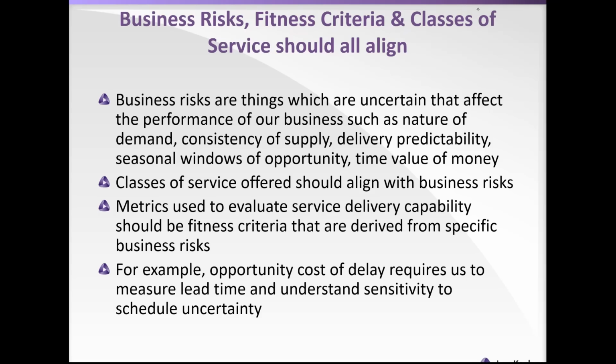So if we care about that, if we care about how long it takes for delivery, then the metric we need is lead time. From the point of commitment, how long will it take until we've received delivery of our request and we can start getting a benefit from it. So opportunity cost of delay is a business risk, and on the delivery side there's the schedule risk of how long it will take to deliver. Therefore the metric we care about is lead time, and if we're managing the risk and opportunity cost of delay, we will have some expectation for what's an acceptable waiting time to take delivery. How much of the opportunity are we willing to lose before we have to move on and do something else?